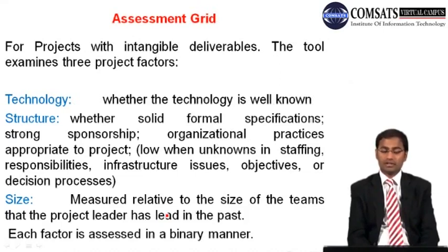technology, structure, and size. So technology, whether the technology is well known, and structure, whether there are solid formal specifications, strong sponsorship, and organizational practices appropriate to the project, low when there are unknowns in staffing, responsibilities, infrastructure issues, objectives, or decision processes.